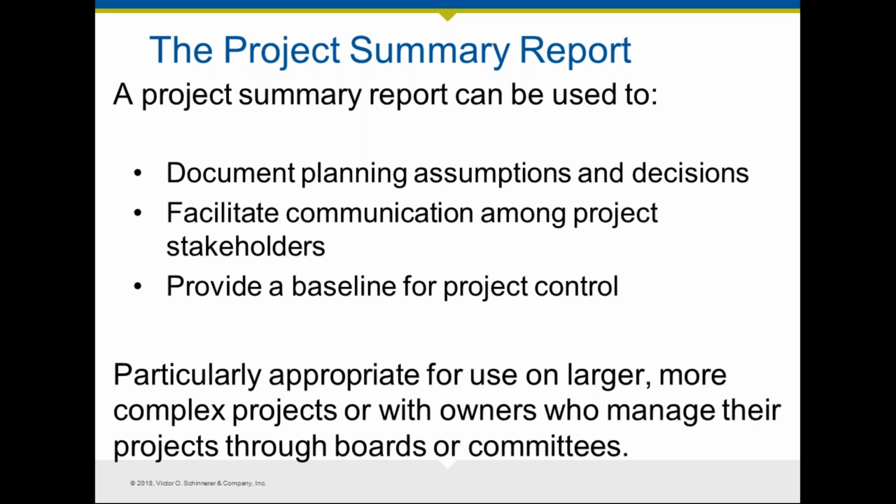It facilitates communication among project stakeholders, and it provides you with a baseline for project control, so that you and the client agree on what the project requires, what you identified as the requirements of the owner, and then you can proceed accordingly.